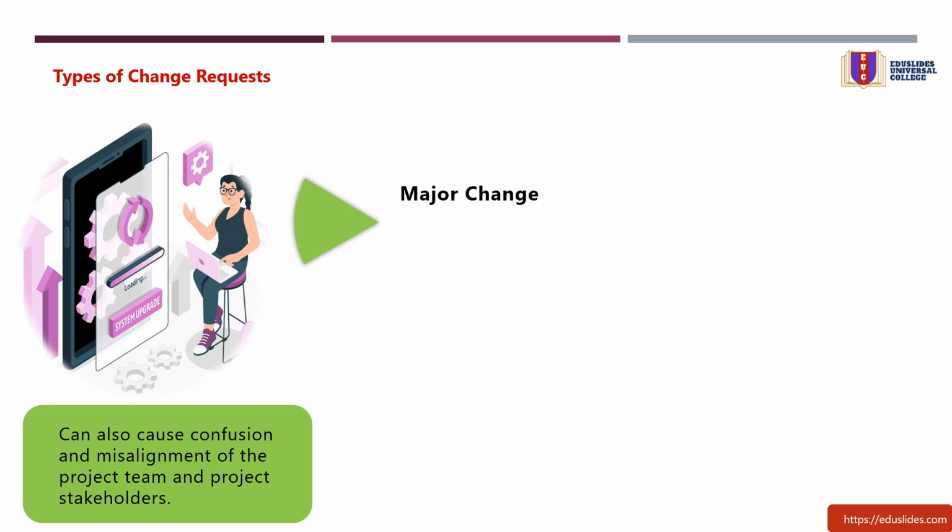Change evaluation is essential for determining the approval workflow and schedule. It requires active management and the Change Advisory Board's (CAB) approval. If applicable, the change request includes a comprehensive cost-benefit, risk impact, and financial impact analysis. Examples of major change include the relocation of a data center or the replacement of an existing enterprise solution.